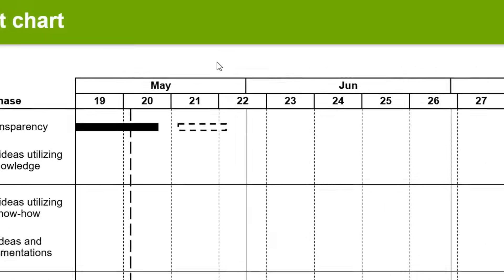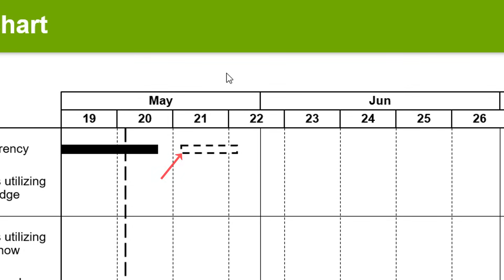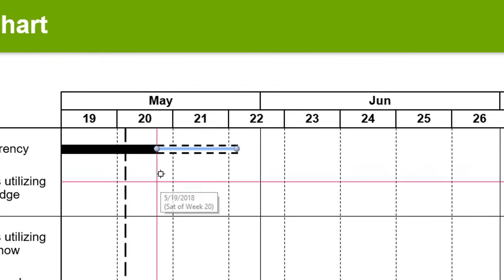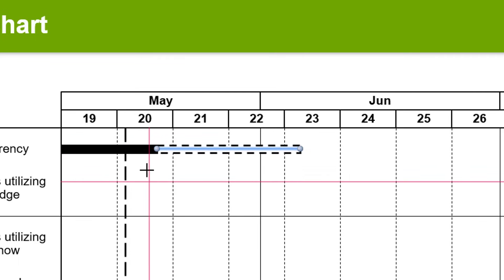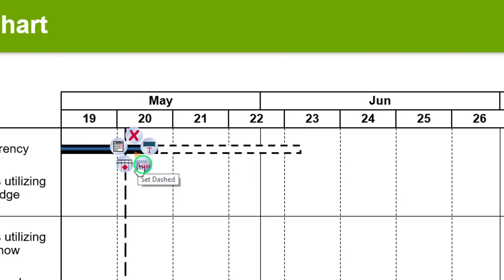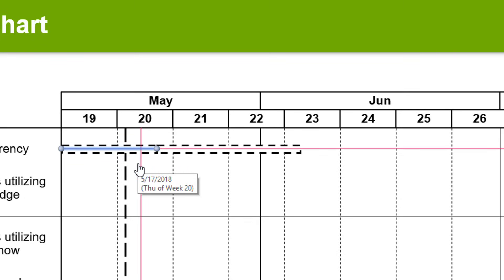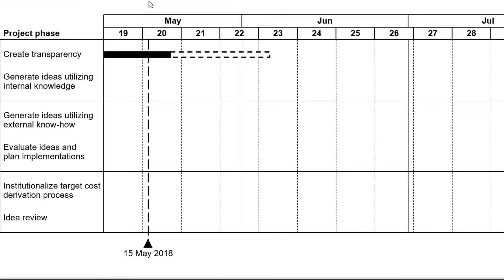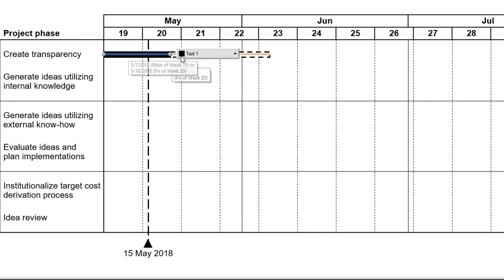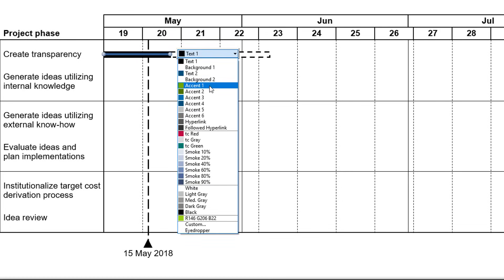You can also see a dashed bar here — this indicates tentative activities. You edit it the same way you would an activity bar. To display a bar as dashed, right-click onto it and pick Set dashed from the context menu. Vice versa, select Set solid to change a dashed bar into a solid one. If you would like to have different fill colors for your bars or other Timeline items, left-click once on the item and choose your preferred color from the drop-down menu.